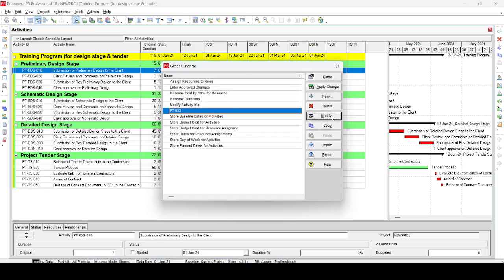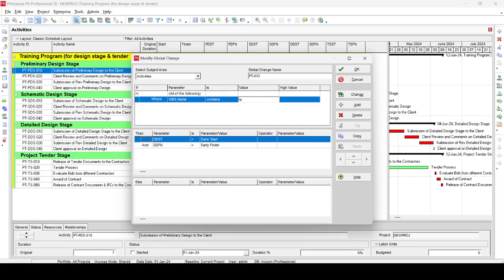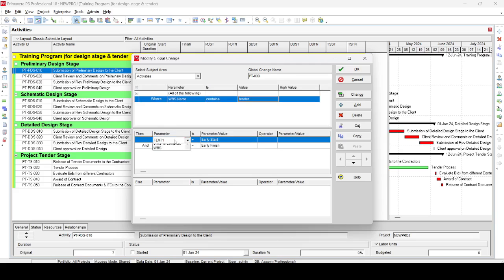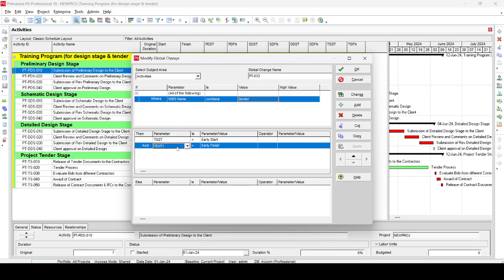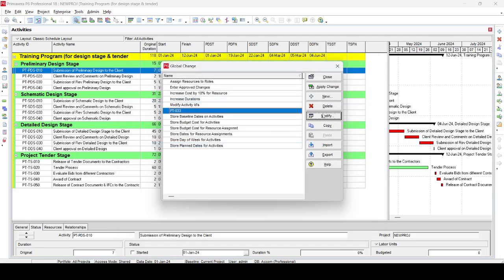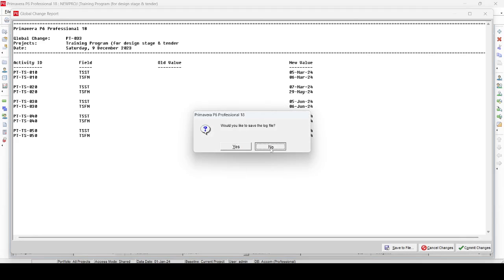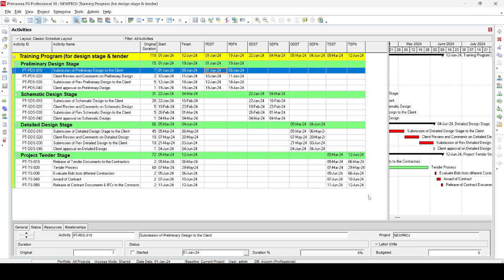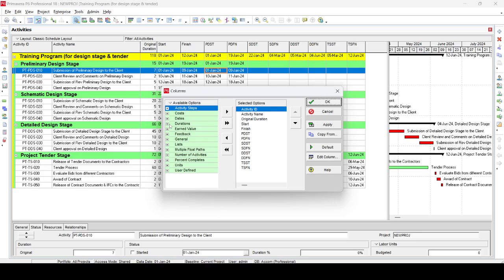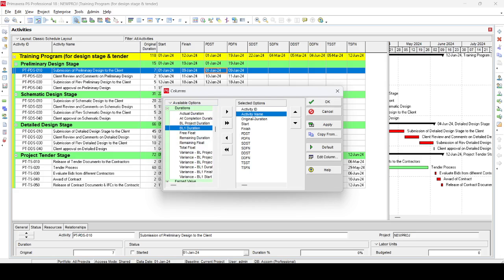Go again to Global Change, Modify. If WBS name contains 'Tender,' then Tender Design Stage Start equals Early Start, and Tender Design Stage Finish equals Early Finish. Apply changes, proceed — we can see five activities (TS010 through TS050) with old values empty and new values populated. Commit changes, skip the log file, and close. All user-defined fields for all design stages are now populated.